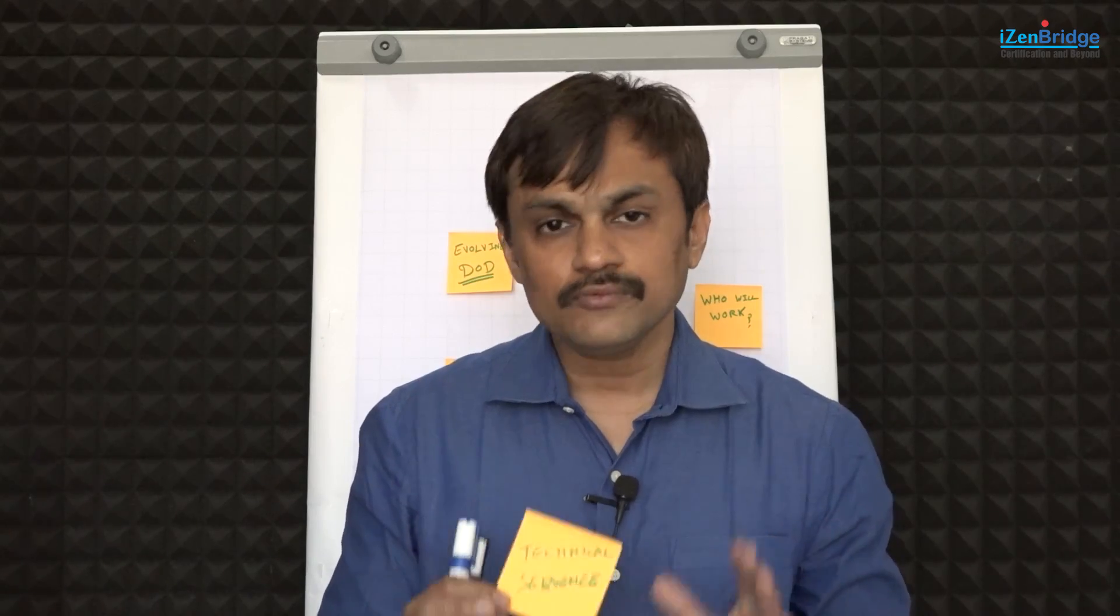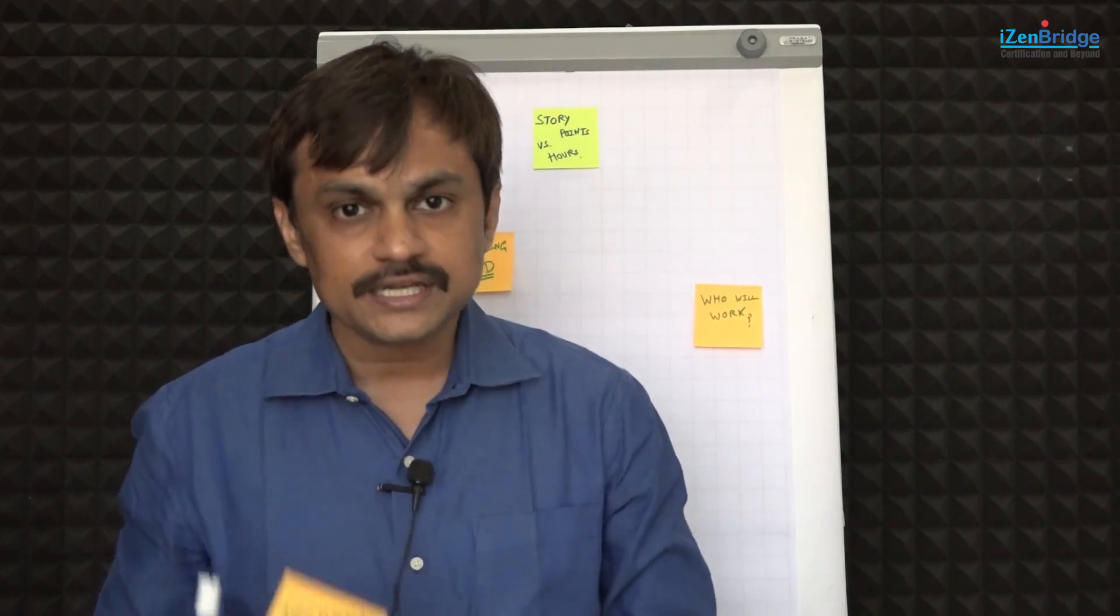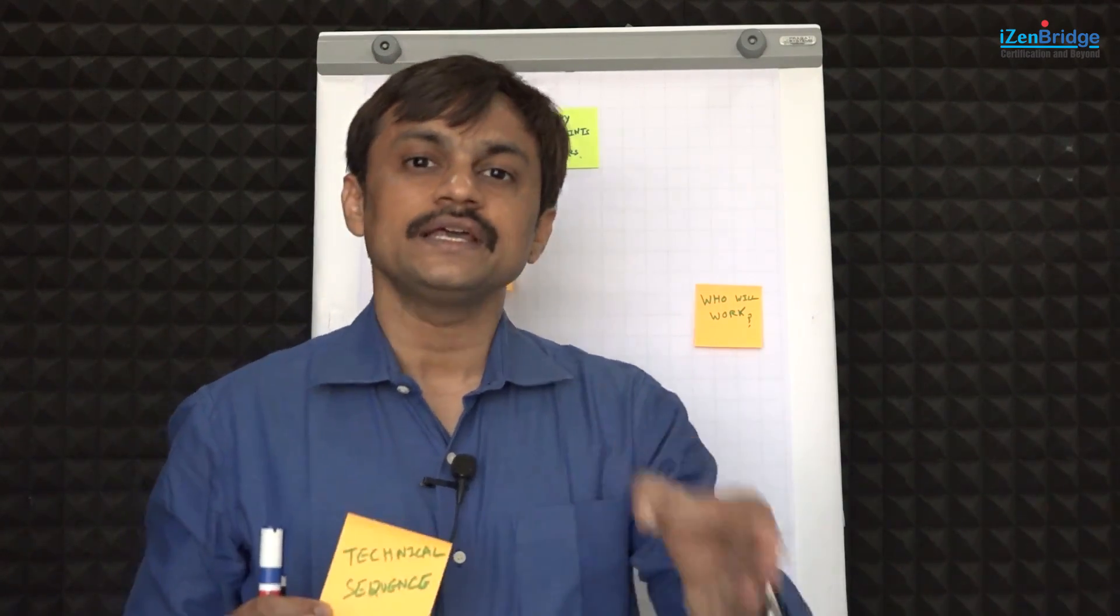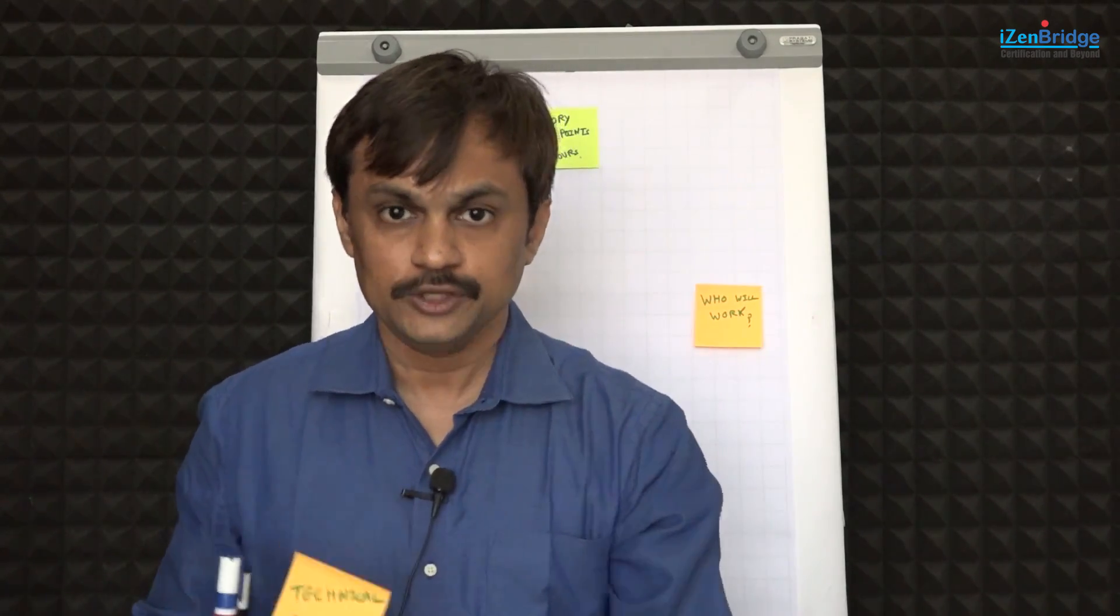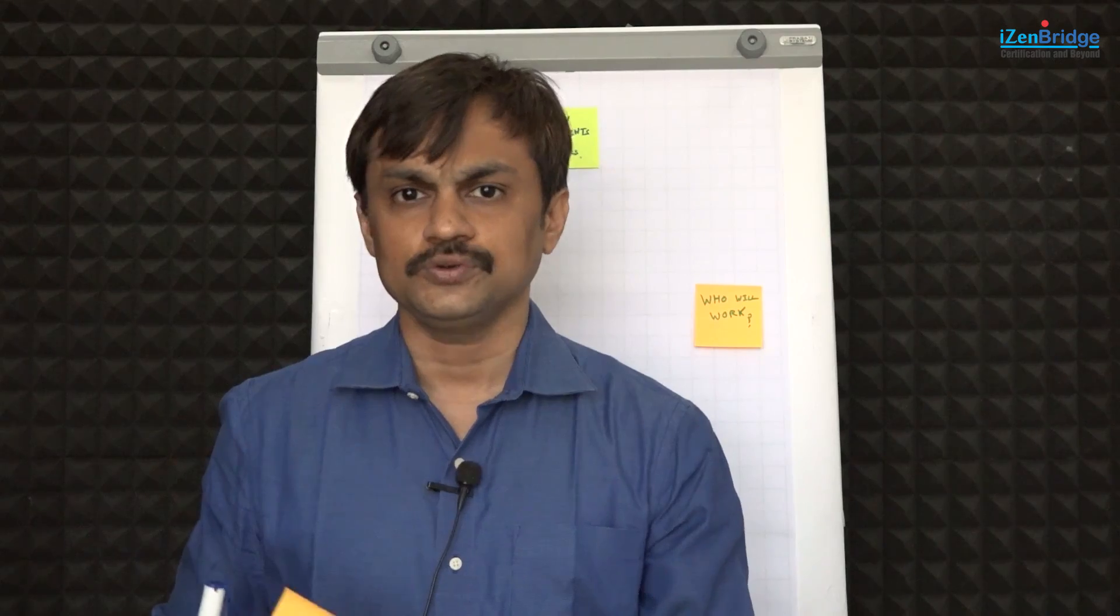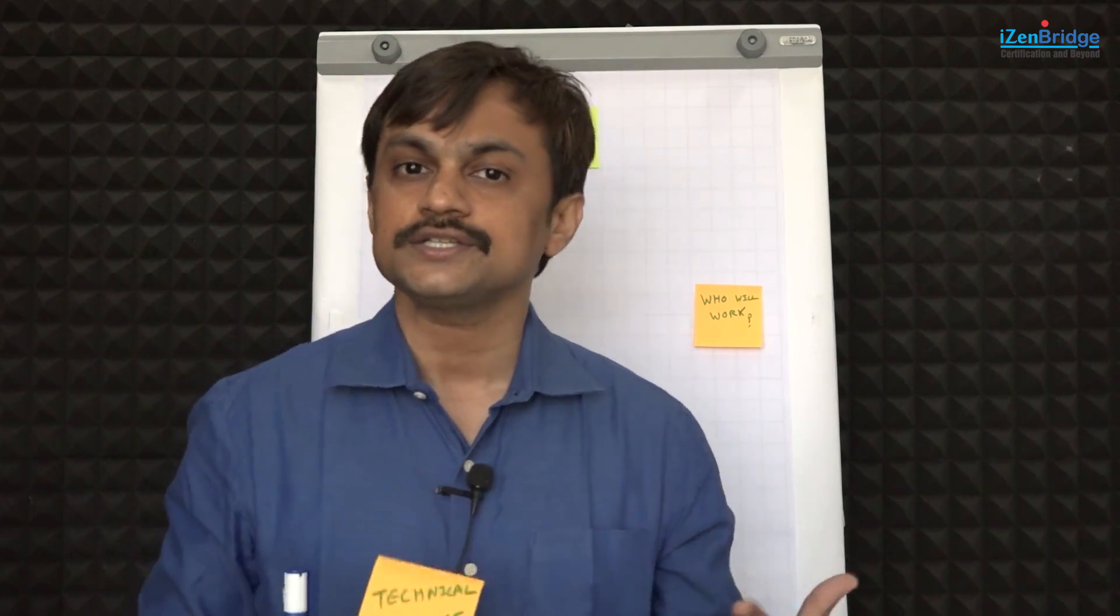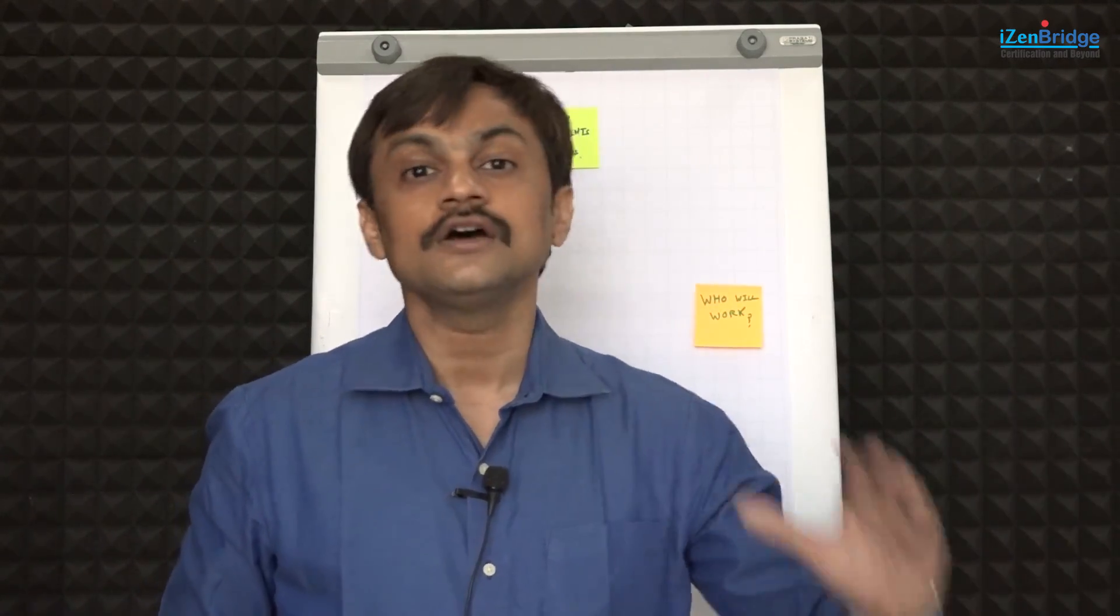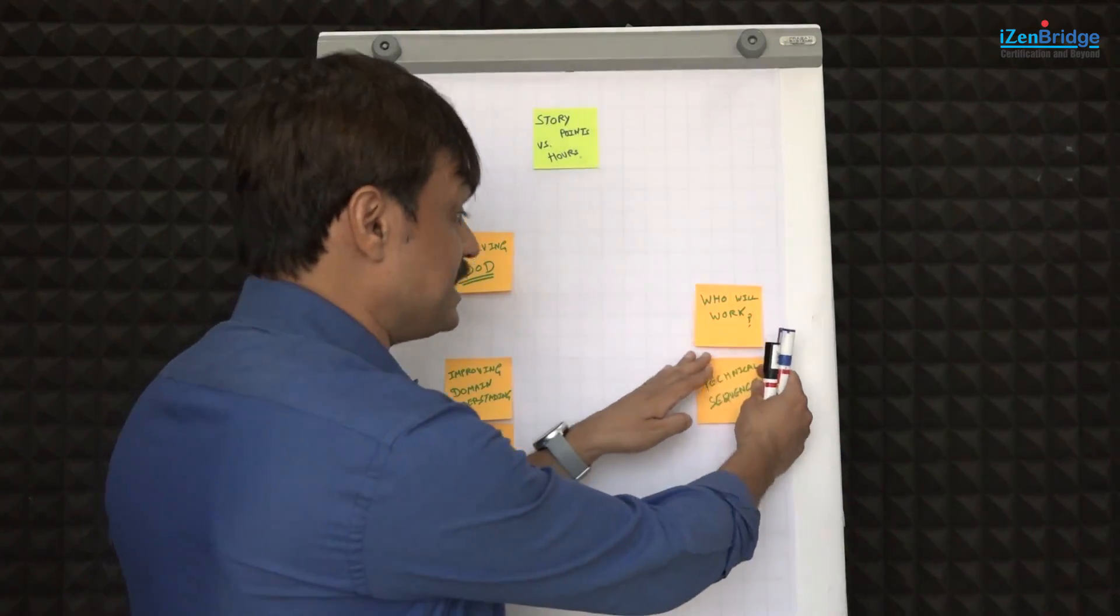When we are doing story point estimation, we're doing it a little bit ahead of the implementation plan. At that point in time, the exact sequence of work is not identified. The real effort consumed in a given user story will be dependent on the sequence. When you're doing sprint planning, you know exactly what you have to do. But when doing story point estimation, you may not have an understanding of when you're going to work on this particular user story. That's why estimating effort is difficult, but estimating the complexity and uncertainty is relatively easier.